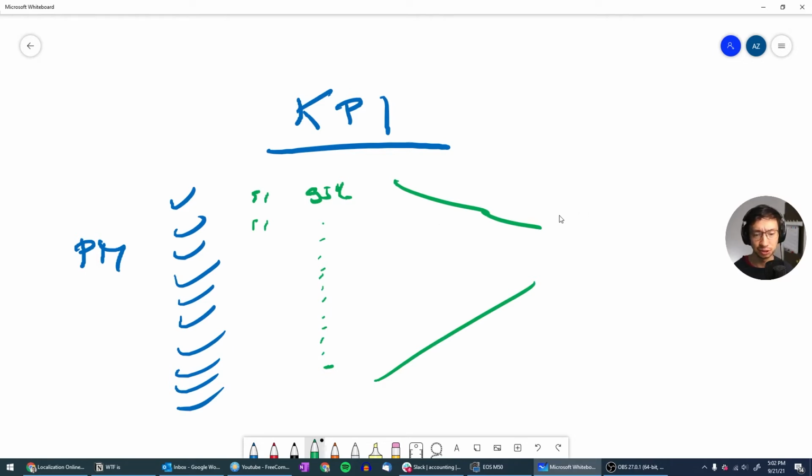So delivering the projects on time, especially if you are constrained by an SLA, if you have an SLA in place with your client, maybe that could be a KPI, which is to track how many projects you delivered within the SLA and how many times you failed. So maybe this could be tracked on a monthly or quarterly basis, and your score could be, I don't know, you delivered 97% of projects within the time. So this may be a key metric for you.